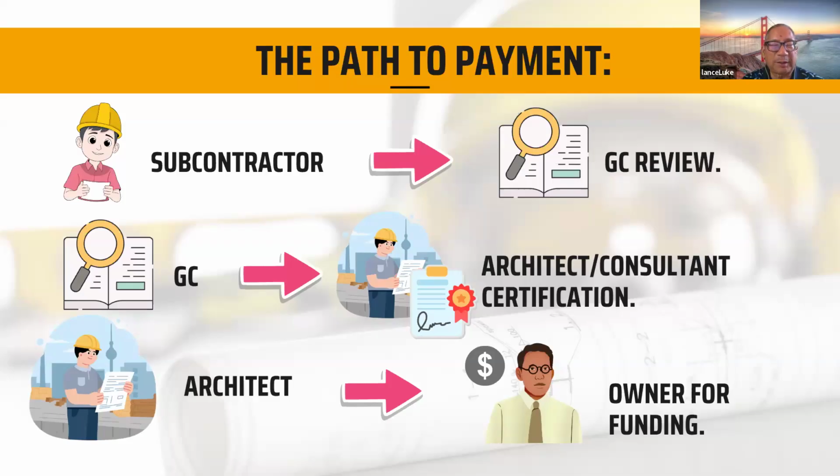And let's say that there's no errors in the general contractor's pay application. Well, it could go pretty smoothly, right? As far as the amounts. But when the architect or the construction manager gets it, and then we have to do on-site inspection to verify items for completion. If some items aren't complete as stated or as billed for, then we have to make an adjustment.